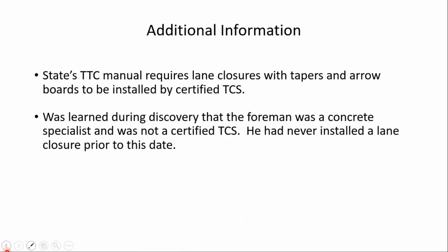Some additional information. The state's temporary traffic control manual requires that lane closures with tapers and arrow boards must be installed by certified traffic control supervisors. And it was learned during discovery that the foreman who was in charge of this crew was actually a concrete specialist and was not a certified traffic control supervisor.